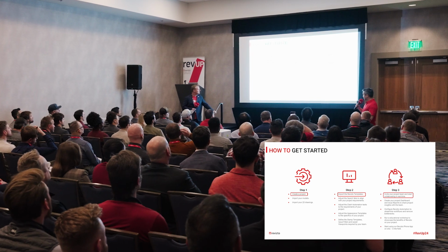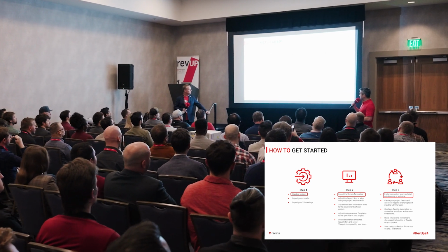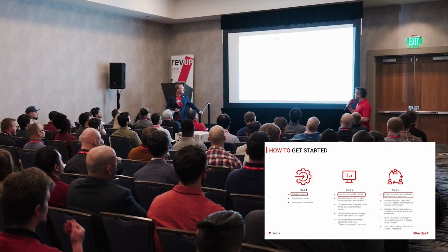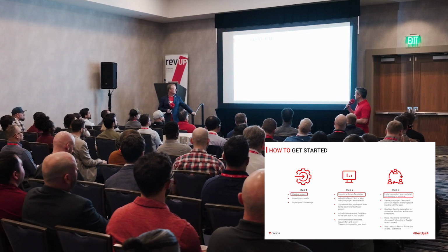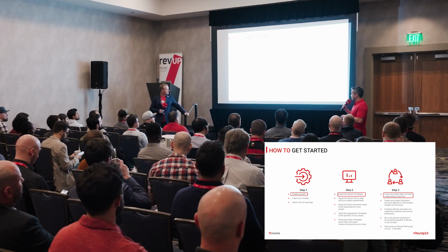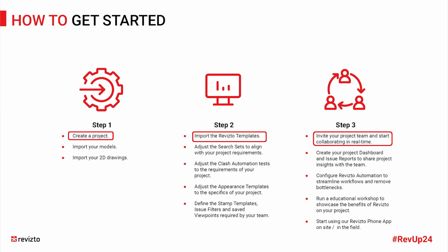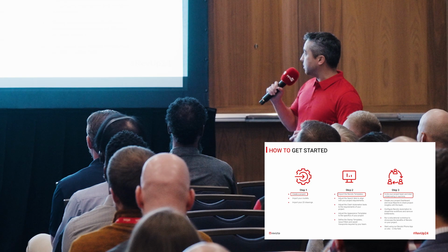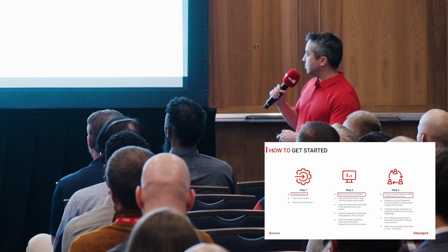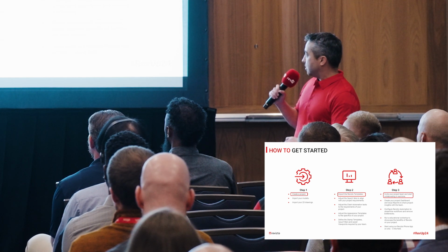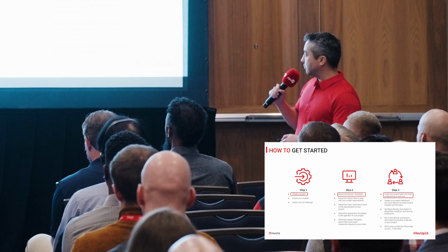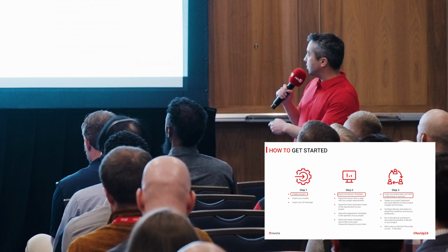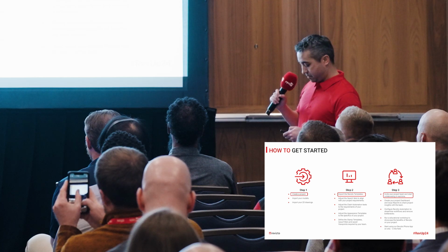Jason touched on this morning that we're now going to have access to Revizto templates that will really streamline your productivity, because they're going to have a lot of that, such as search sets, already standardized clash tests that you can import directly into your Revizto project. You'll just download them from our Revizto workspace. And then once you get those mapped correctly, because you will have to remap those search sets to your models, you can start to invite the rest of your project team.